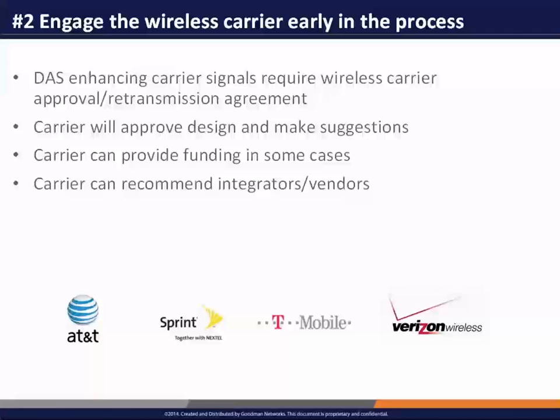The second piece of this is it's critical that you engage the wireless carrier very early on in the process. And the wireless carriers have made a huge investment in wireless frequencies. You need to treat it almost as a resource that they own. So they're going to need to approve any systems that are retransmitting their frequencies. And right off the bat, let them know what your plans are. There's no exception to that policy.